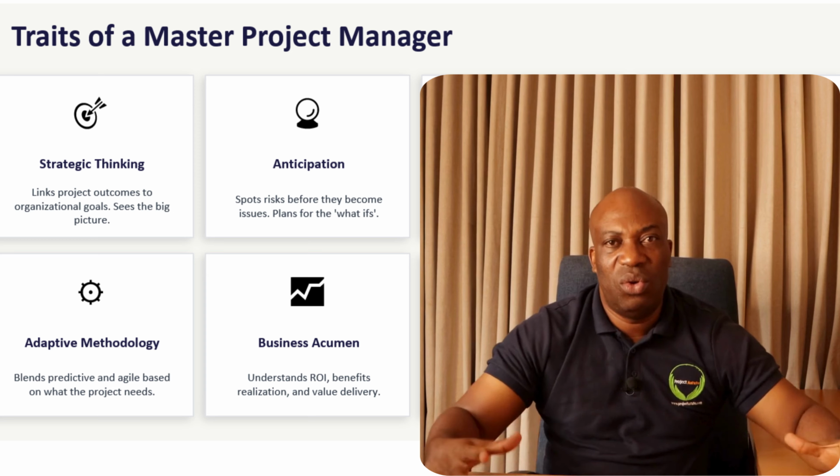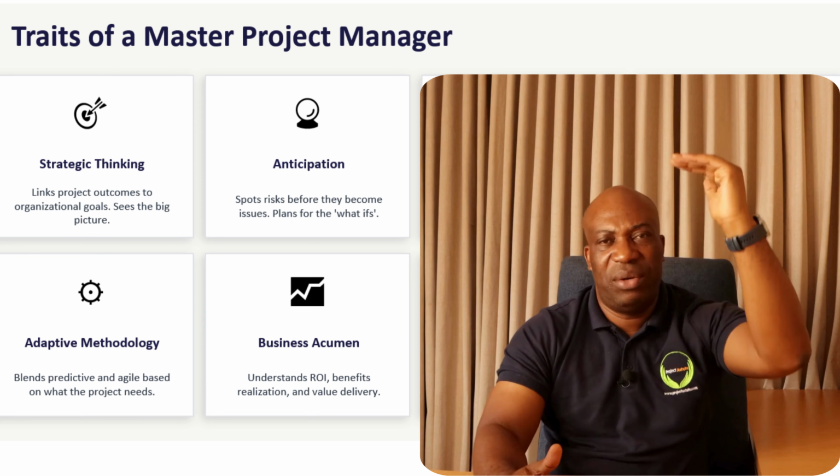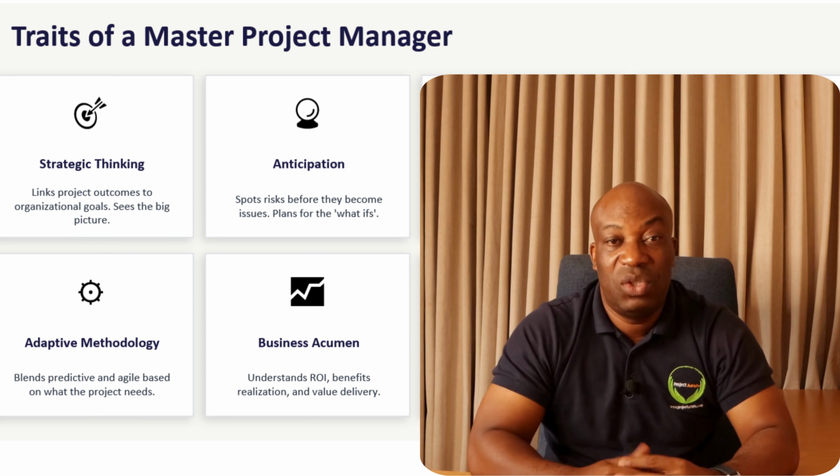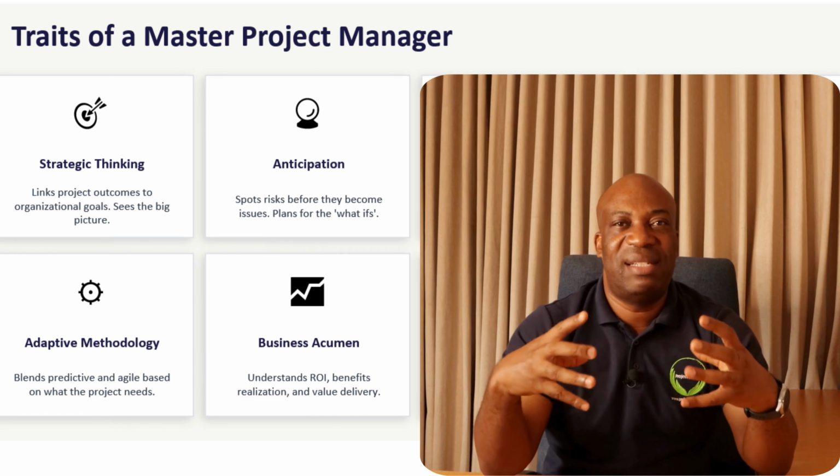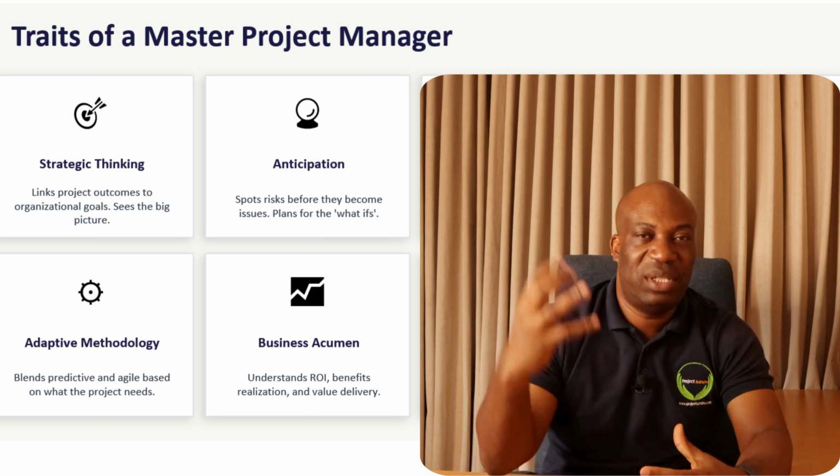You need to know upfront how many floors you are going to have for that building, so that the foundation is actually designed and constructed to support that. You cannot say, now you're constructing the 3rd floor, then you decide, oh, now we need to put 10 more. The foundation might not sustain that. So you need to decide as a project manager which methodology is best.